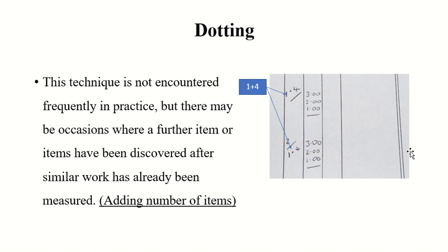In time sync you will see this type of thing as well. There is something called dotting. This is also in the time sync column. You will see a number, a dot, and then the other number. A dot means plus. Simple. A dot means plus. And a slash means what? Ratio, right?